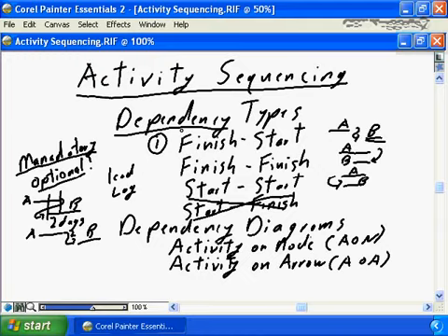So work on the dependencies, ensure you have the right dependencies created for your project plan, and that only the mandatory dependencies are created will result in the simplest, easiest project dependency diagram for you to debug. What is a dependency diagram? There are two types of dependency diagrams. Activity on node is the most commonly used. It is the type of dependency diagram that will be used by project scheduling software. And a second type of dependency diagram sometimes used, often in academic explanations of dependency process, is activity on arrow. We will look at both of these dependency diagrams in just one moment.